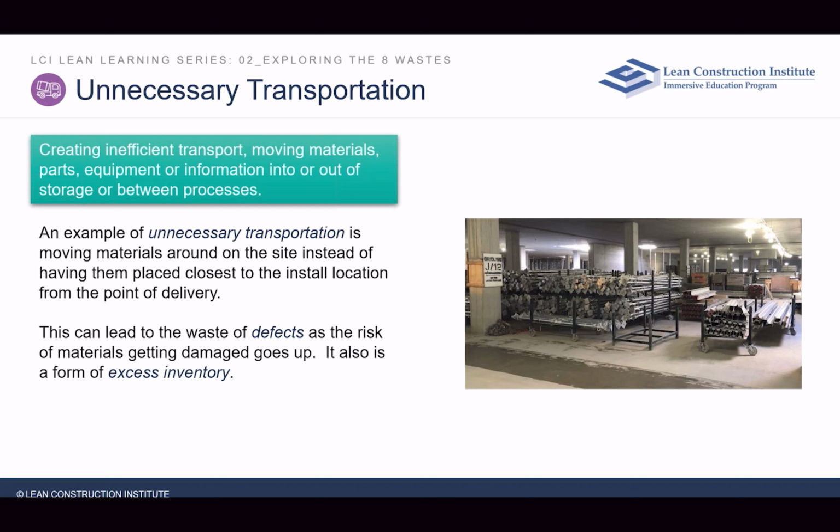We do know that we have to carefully coordinate concrete deliveries so that we don't have concrete sitting there waiting in a truck to be delivered to the site. So that is a usually well-orchestrated event on a job site, because we can't let the concrete wait and set up inside of a truck. We don't want to waste that material.